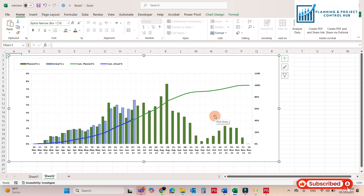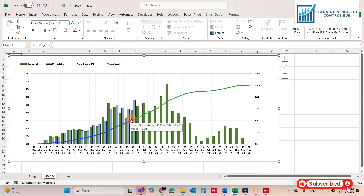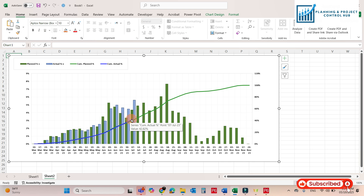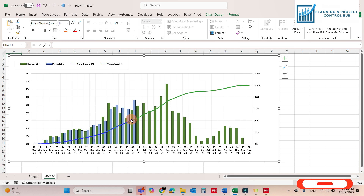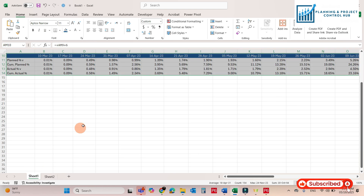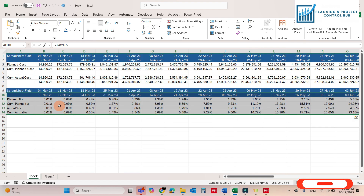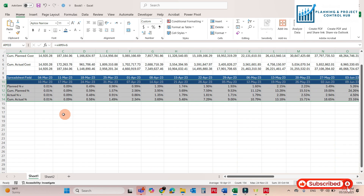By this way you can make the S-curve. Now we will make the dynamic S-curve. This current S-curve is not dynamic, so we have to make it dynamic. For the dynamic S-curve we have to take a reference table. Why are we making the dynamic S-curve? Because sometimes we have to show management a small portion of the S-curve — just for four or five weeks like this — and we cannot show the whole S-curve from start to end. We just have to show them five or six weeks. For this purpose we develop the dynamic S-curve.